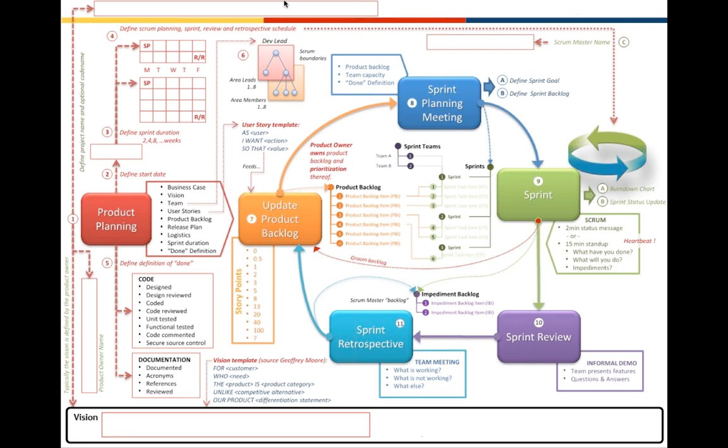You work on those stories that you have committed against that velocity. So if you find all the stories which summate up to 30 story points, if you've set the velocity of 30, you commit to those stories that in the next 2 weeks, you're going to try and finish these stories. So then you're running the sprint, which is this green box here.